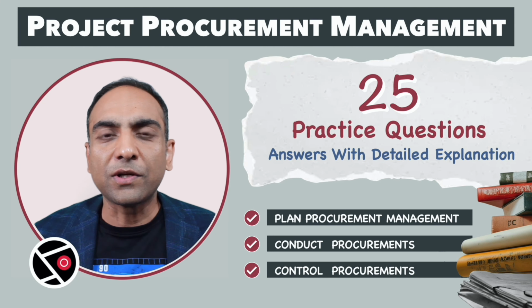This organization also had a common software division that supplied software to all these BUs. The BUs acted as buyers, and the software division as a supplier. Both belonged to the same organization, and the software division was still external to the projects owned by the BUs. B is a correct statement.